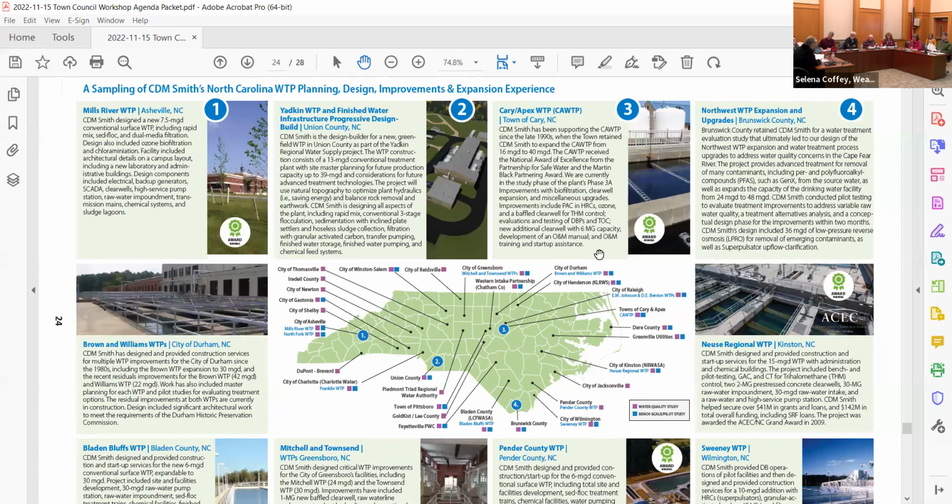And what I thought was really great is that they have projected that they could have a product, even if it's in draft format, in 5 weeks for us. I think a lot of that is because they're familiar with our area, but they're also very efficient in the way that they're doing the report. It's not cheap to have this done. It's $29,800. But I believe it serves this project and the town's water source, along with folks that live on the Ivy. I think it's important that we give strong consideration to this, and I would recommend that town council allow us to go ahead and execute this contract and have them begin to work.